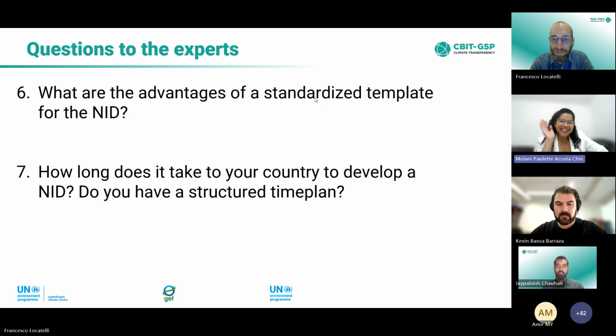Well, ideally, we need 18 months to prepare all these documents, but in reality, that's impossible. If you secure the funds, you secure the team, and with all the different administration that you always have in a government, it is impossible. But we manage, if at least we have 14 months minimum, we could manage to have a quality document and process.